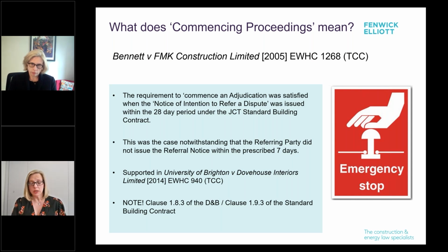This decision was supported by the case of University of Brighton and Dove House Interiors. In her judgment, Mrs. Justice Carr, as she then was, considered the position as being akin to facing the expiry of a limitation period. In that circumstance, issuing a claim form or a notice of arbitration is sufficient to stop the clock. So Mrs. Justice Carr established that the same rationale should apply to this provision.